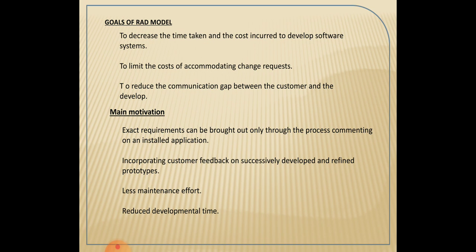See, in the iterative waterfall model, the customer requirements need to be gathered, analyzed, documented, and signed off upfront before any development could start. Before starting any development phases, we need to gather, analyze, and document the customer requirements, and strictly based upon the customer requirements, we develop a software, and there is no chance for the customer to give his feedback, because he is not experiencing any system.